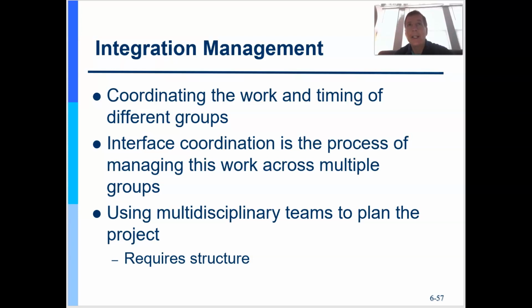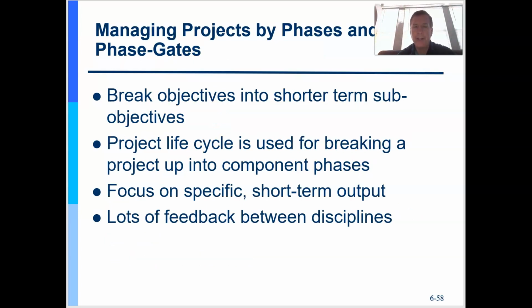And your key document is the project management plan that you built in detail and the project charter that goes with it. It's those items that you will use to monitor and control and perform integrated change control on and close along the way as you manage these multidisciplinary teams, right? And you'll manage them through various phases. We talked about phases a little bit ago, but phases are a logical breakdown of how the project should develop. So the nice thing about project management, and I said this week one, is it's a framework that can fit into any life cycle with phases.